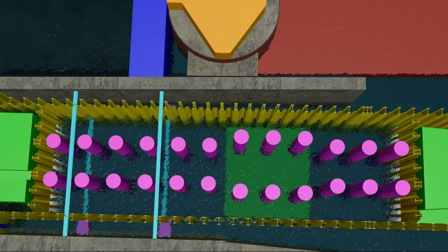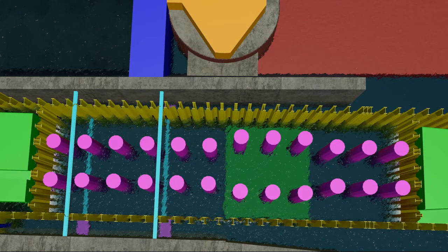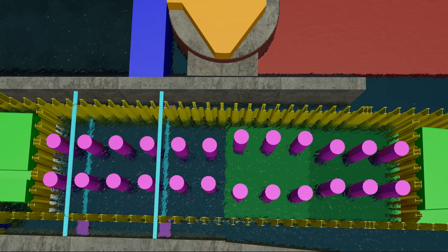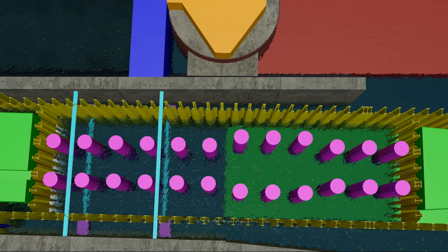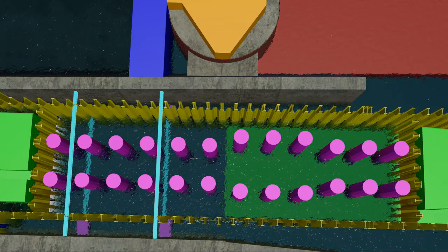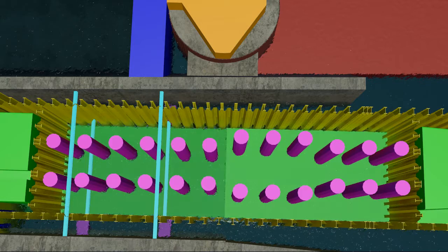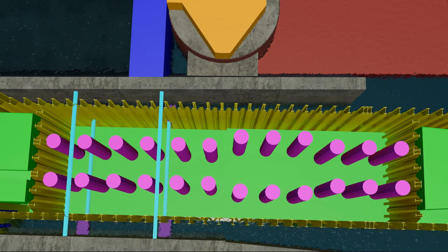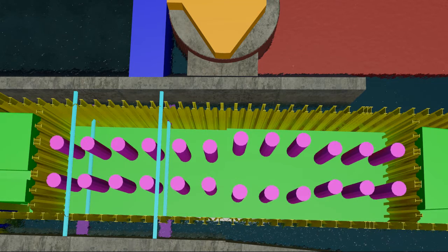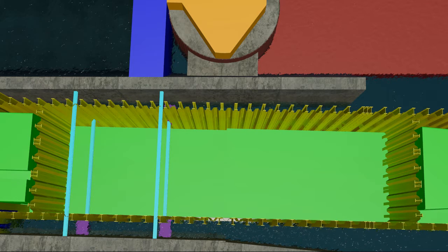We place tremmy concrete for M25, then M26, and later M23 through M24. We dewater the coffer box, remove the drilled shaft casings, and the transverse coffer box walls.